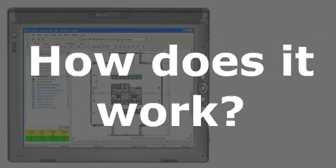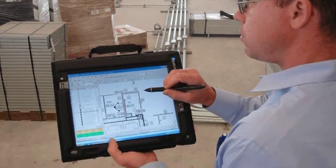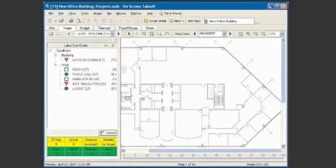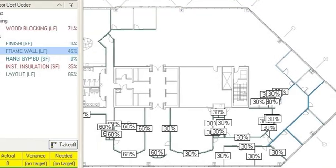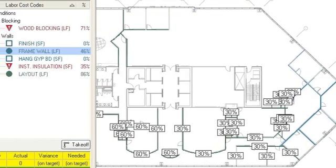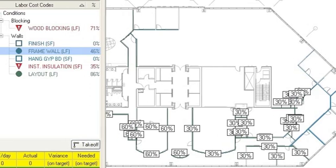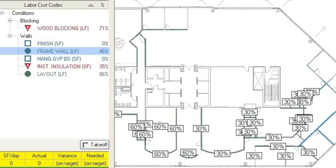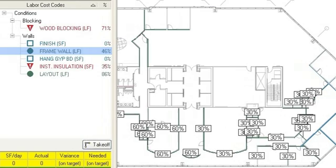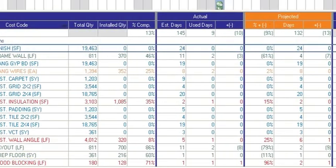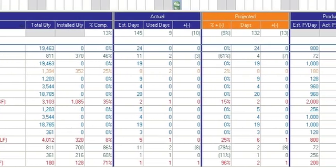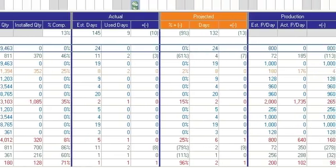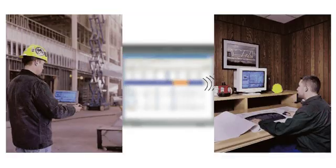So how does Digital Production Control work? A project manager, superintendent, or foreman walks the job and marks up the percentages of what's been completed. With the estimated production rates already in place, Digital Production Control uses a color-coded system that allows the user to instantly see if they are achieving, outperforming, or falling behind the estimated production rates. This information can then quickly be sent over the internet to the office.